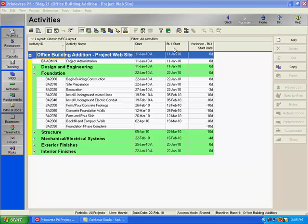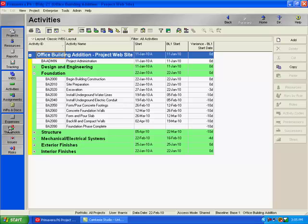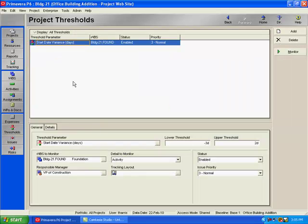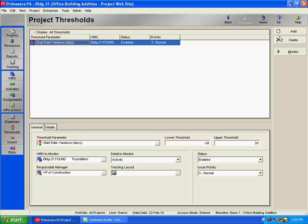So let's go and set up a threshold. If you look over on your directory bar, there's a button or a window that can be opened entitled Thresholds. So I'll click on Thresholds. I've already set up a threshold called Start Date Variance in Days. You just need to come over to your command bar and click the Add button to add a new threshold.